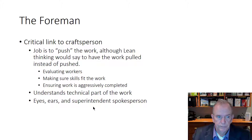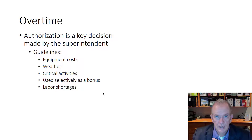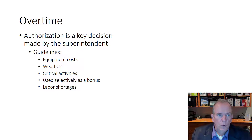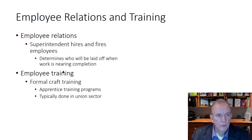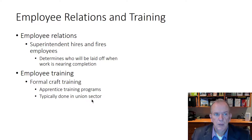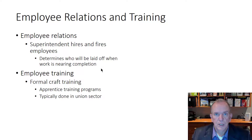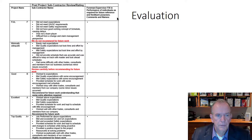A good foreman truly understands the technical work and serves as the superintendent's eyes, ears, and spokesperson on the front line. The superintendent must build good working relationships with their own foremen and with subcontractor foremen. The foreman also handles overtime authorization. Employee relations — training, apprenticeship programs, knowing who goes where and when — involves coordination between the superintendent and, on larger companies, the HR department.